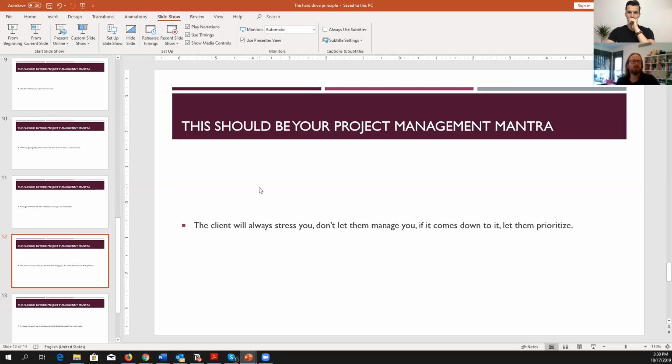And if the client, for instance, says, no, we definitely need this now, drop everything, you say, okay, you're right, now prioritizing. You will get this before you get that. If a client shoves additional tasks into the process that were not taken under consideration, as I said, you need to revisit your process, you need to prioritize the deliverables, and then update the client.